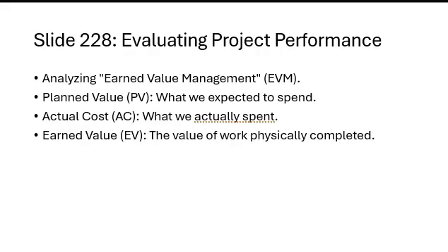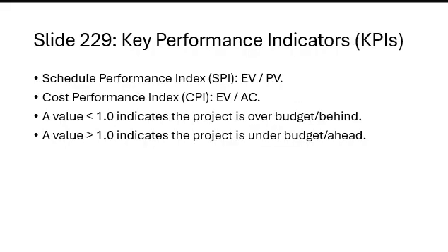Evaluating project performance. Earned value management analyzes project performance metrics. Planned value shows the expected spend for the project. Actual cost shows what was actually spent. Earned value shows the value of completed work. The comparison highlights the efficiency of project execution.